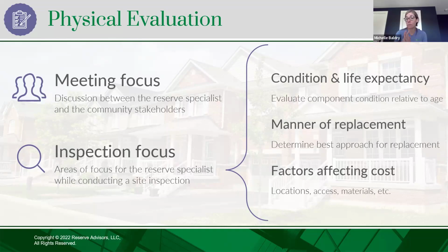Or it could be the reverse. It could be an 8-year-old roof that's in poor condition. We're not going to give it another 10 years of life because that's a normal life. If it's failing, you're going to need to replace it ahead of time. And so we want the reserve study to be reflective of the true needs.